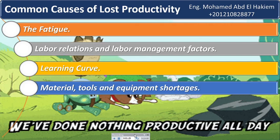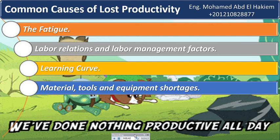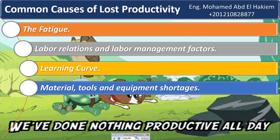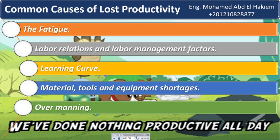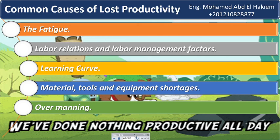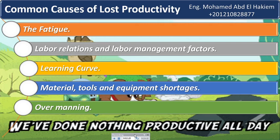Sixteen: material, tools, and equipment shortages. If material, tools, or construction equipment are not available to a crew at the right location and time, the crew's productivity will probably suffer as they may be unable to proceed in an orderly, consistent manner. Similarly, if the wrong tools or improperly sized equipment is provided, productivity may also suffer. Seventeen: overmanning. Productivity losses may occur when a contractor utilizes more personnel than originally planned or can be effectively managed, because the contractor may be forced to use unproductive labor, there may be shortages of materials, tools, or equipment, or the contractor may be unable to effectively manage the labor due to dilution of supervision.